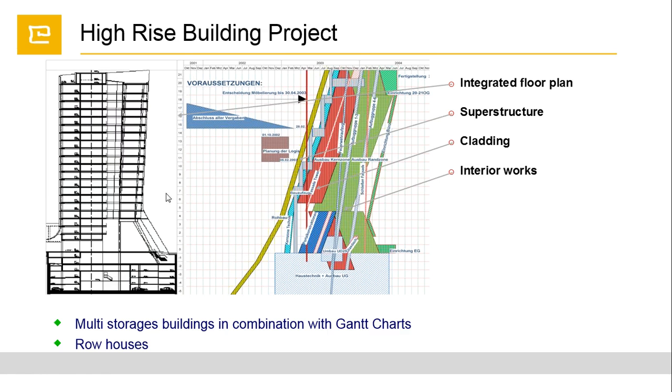This is one of the samples. What will we include more? We will include more drawings and information, and this will be synchronized with our activities. The vertical dimension is the distance, locations, and the horizontal is time. So here we can show our storage and our floors on the left part, and based on this our activities can be drawn.